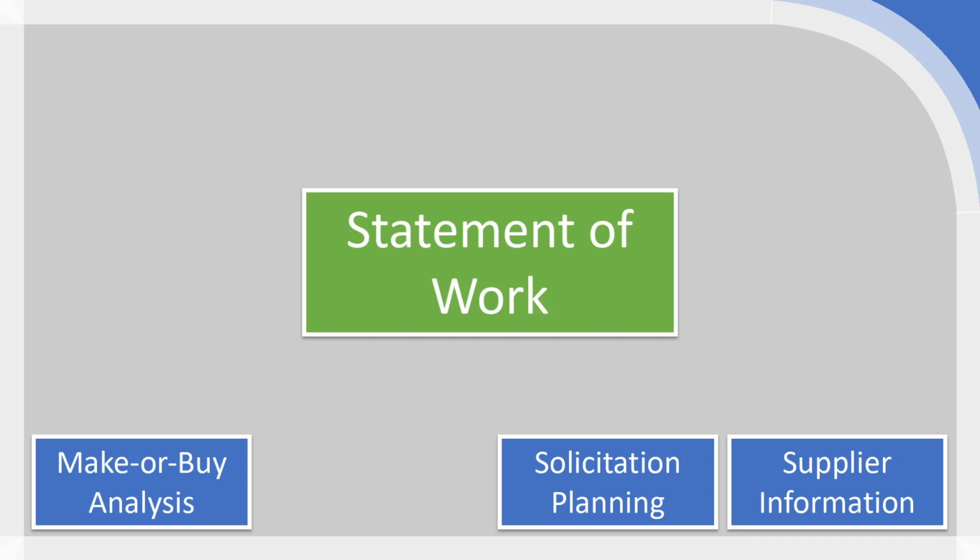Without a statement of work, which is essentially a statement which lays out all of the relevant details of the input that is required. That may mean the quality specifications, it may mean applicable standards, it may mean the precise details of the acceptance criteria. So what output is acceptable, what isn't, as well as the general scope as well.